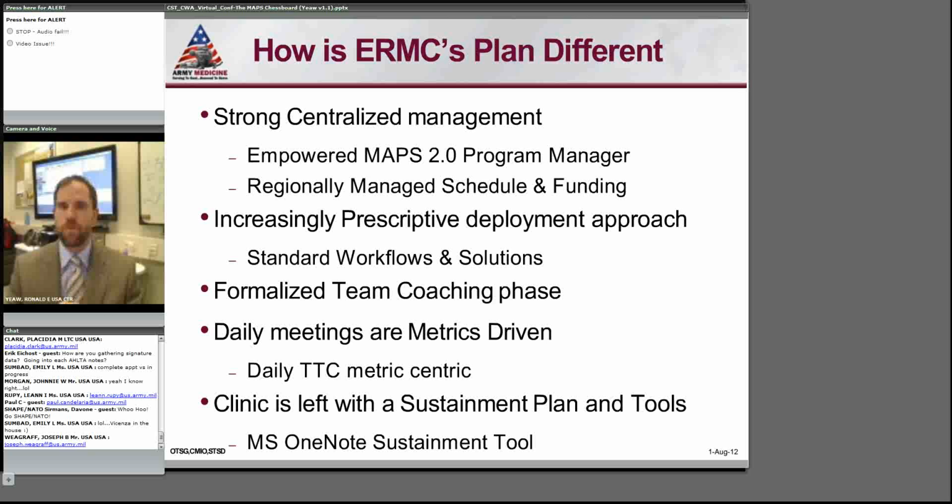that day. Now, I'm not saying they have to be closed, but I say time to close isn't everything, but it's a symptom of everything. When we come to a meeting at 4 p.m. and they've got 30% of their appointments open, we step back and say, where did the process let you down? Where was your support staff not able to help you that you weren't able to close those encounters? And again, I don't mind them being closed. I just need to make sure they could have been closed.